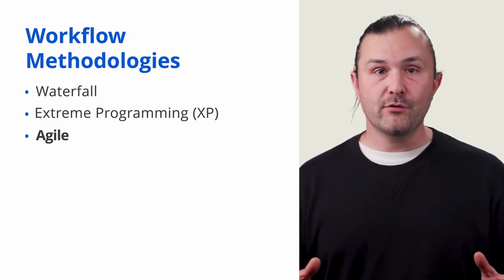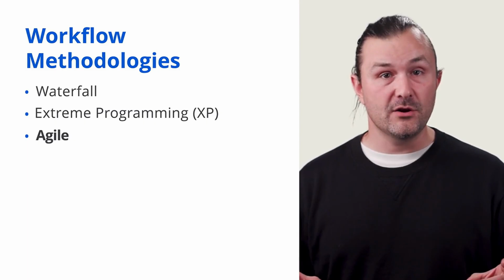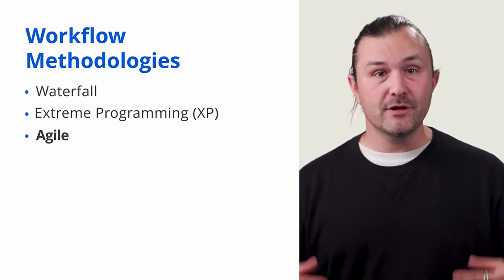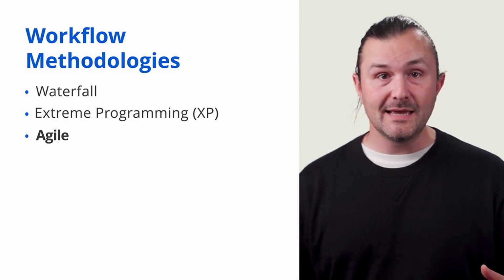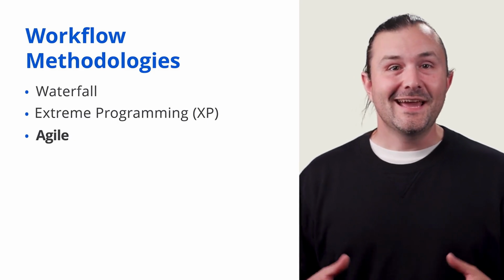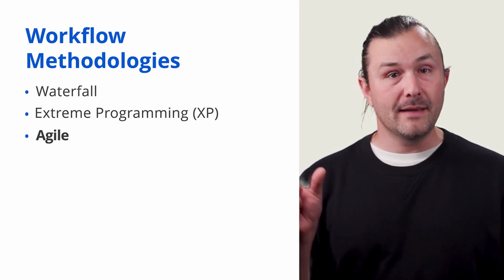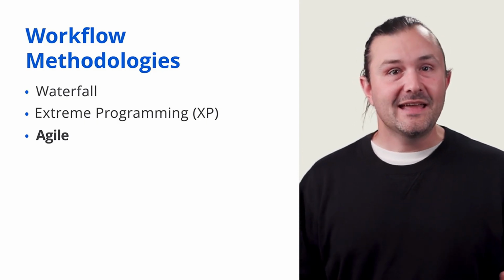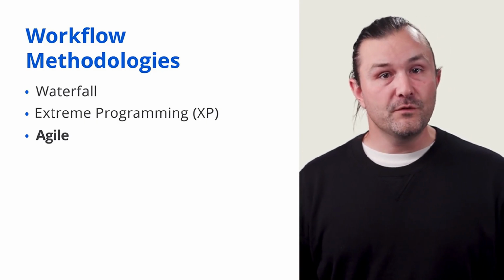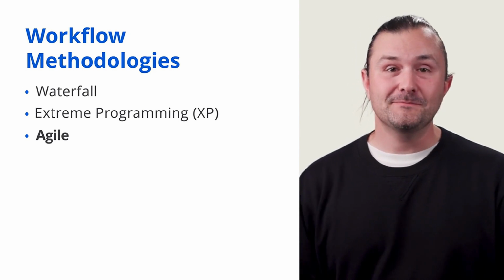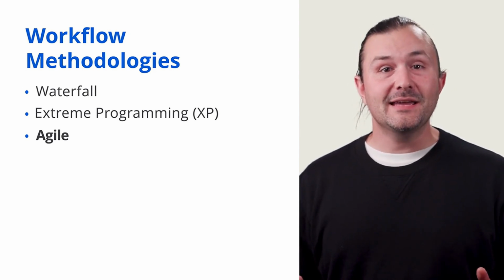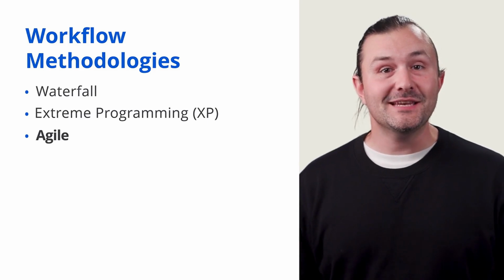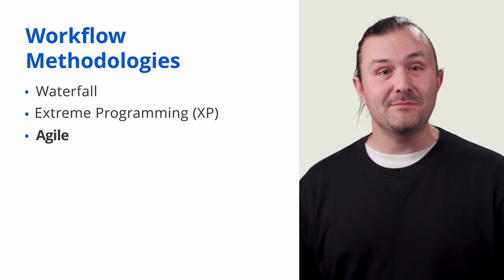Agile methodology, however, is particularly popular in engineering. Agile is an iterative approach that promotes flexibility and customer collaboration. In Agile, projects are divided into smaller, manageable chunks called sprints, which typically last 2 to 4 weeks. At the end of each sprint, the team reviews progress and plans the next steps. Agile methodologies allow back-end engineers to adapt to changes quickly and continuously improve their work based on feedback.